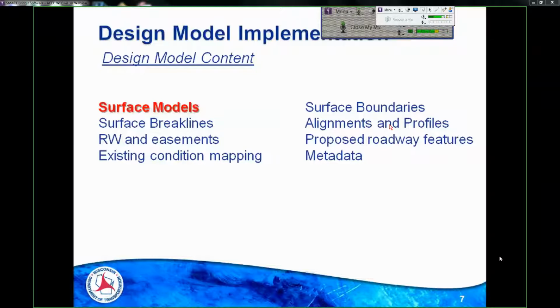So they're virtually moving the dirt. They're trying different crew configurations. Let's run this project with an 8 scraper crew and let's see how it plays out. Let's run it with a 12 scraper crew and let's see what that timeline and that sequencing looks like. And as more DOT projects start to deliver these things, contractors can start to do a more thorough job of planning their entire operation, at least the DOT side of it. They're able to virtually construct these projects with the information that we're giving them, and it's not taking a lot of effort because it's formatted in a way that they can just start using it right away. So we kind of expected to hear some of those things.